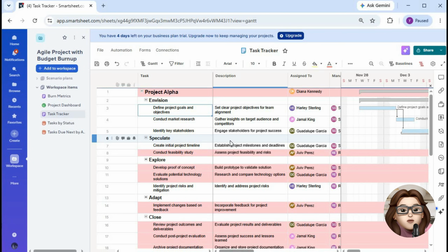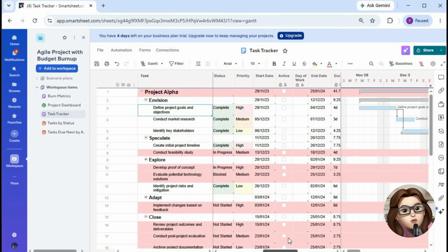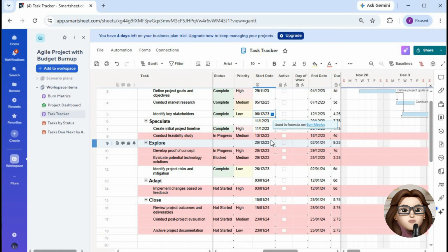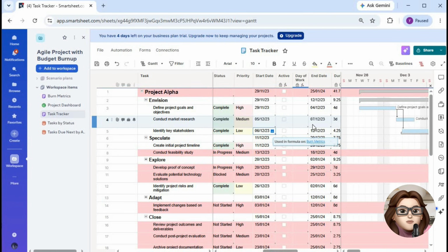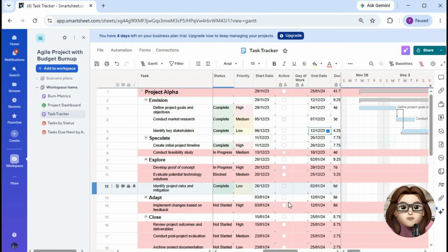the project timeline. Review the allocation percentages and task durations to identify any team members who may be overbooked or underutilized. If needed, adjust assignments, dates, or allocation percentages to create a more balanced workload and ensure resources are used effectively. Continue updating task status and schedules as the project progresses so your capacity calculations remain accurate.